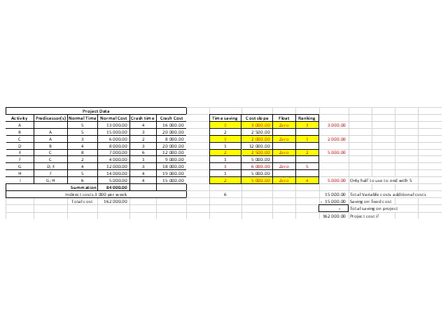If you want to have a look at it, please have a look on page 187, and you will see that the increase in cost over the reduction in time will give you your cost slope, or in other words, it's your crash cost less your normal cost divided by your normal time less your crash time. So what we do is we calculate each one of those, and let me just get to that memo.